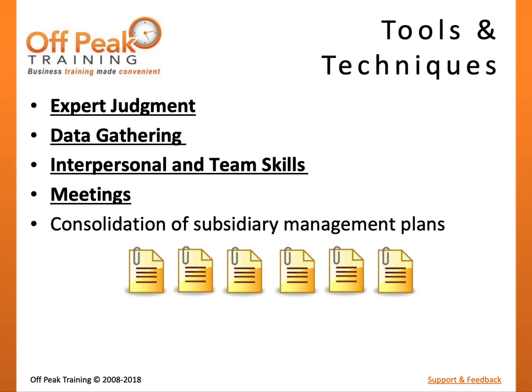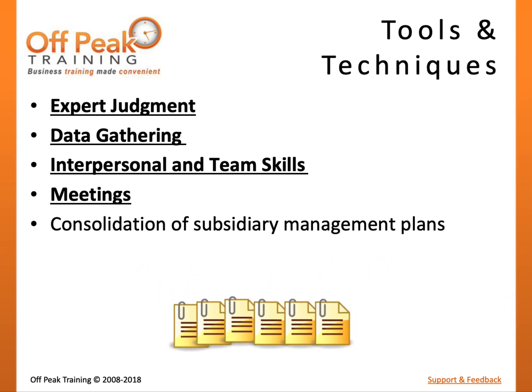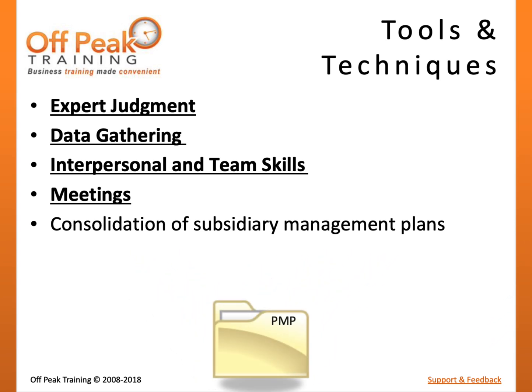The project management team will need to leverage interpersonal and leadership skills, such as managing team member conflict or disagreements, facilitation, and efficient meeting management. While not listed in the PMBOK guide, it could be helpful to consider the main technique of this process as the consolidation or integration of all of the subsidiary management plans into one collective document or folder known as the Project Management Plan.